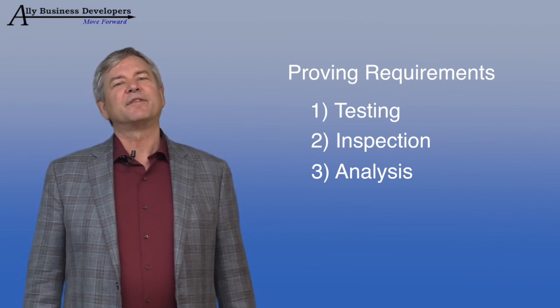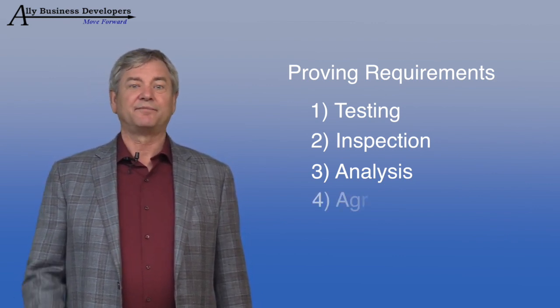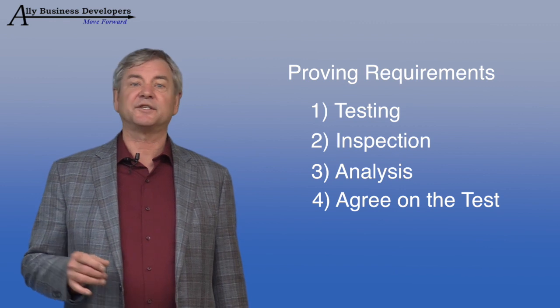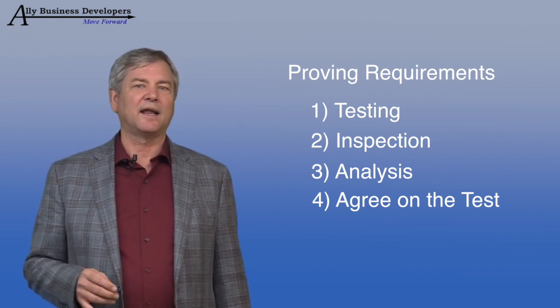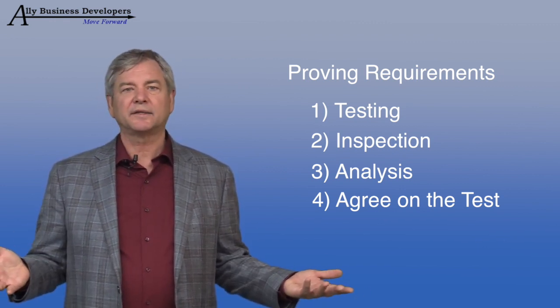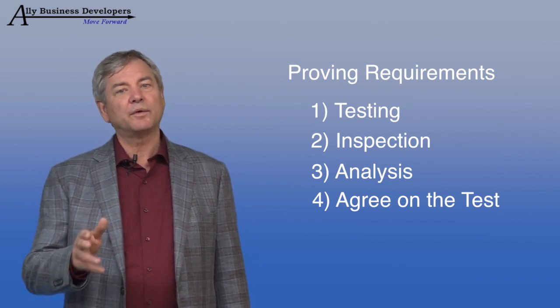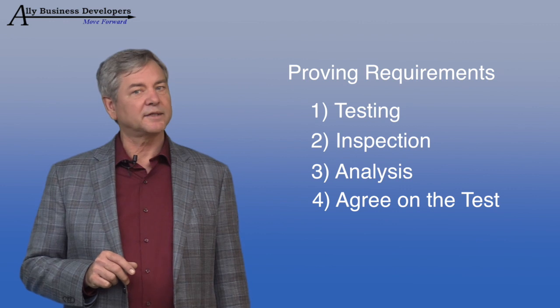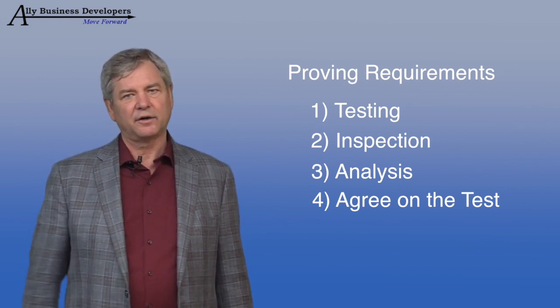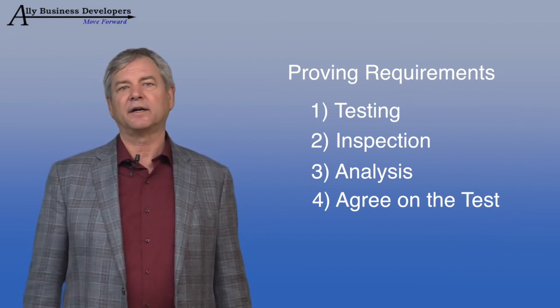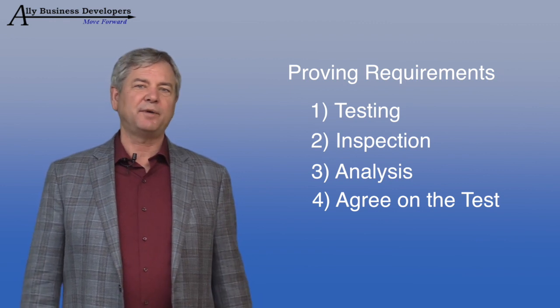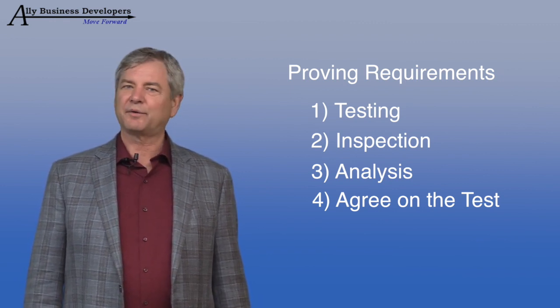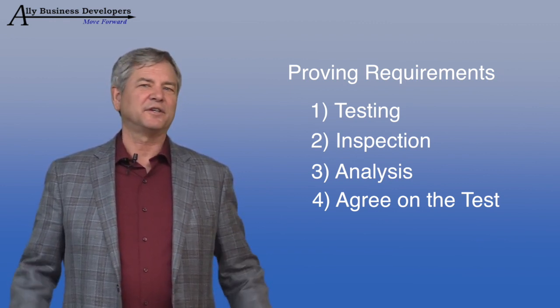So we added a fourth method for accepting requirements. If you can't test it, if you can't inspect it, and if you can't analyze it, at least agree on a test. I won't accept a requirement until my QA department has figured out how to test it. That is a hard and fast rule that I never violate. Get your QA people on board while you're developing your requirements. From my personal experience, it's a lifesaver.